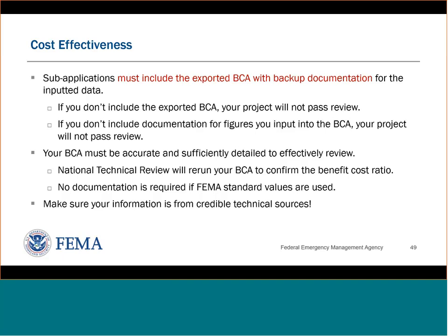All right. So two things. If you don't include your exported BCA file, your project will not pass review. And if you don't include documentation for the figures you input, your project will not pass review. So your BCA needs to be accurate and sufficiently detailed. The National Technical Review will rerun your benefit cost analysis to confirm your findings.